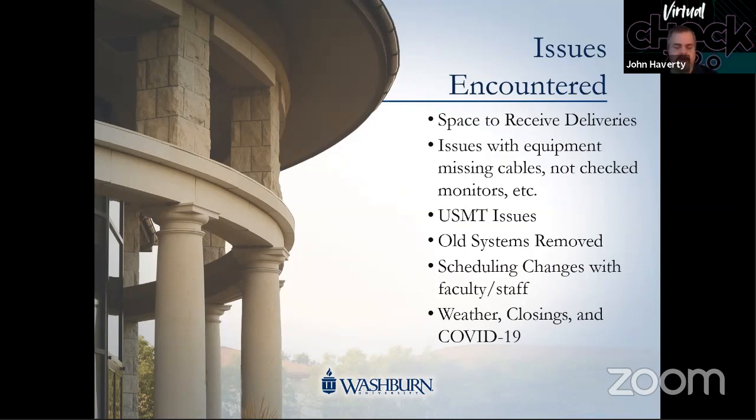As I mentioned earlier, we used USMT to do the migrations. That process worked very well. We had lots of success with it. Some issues here and there that we were able to tweak or troubleshoot and get resolved. About halfway through this, we use SCCM for our deployment for imaging computers and deploying software. Of course, they changed over to Microsoft Endpoint Configuration Manager, or MECM. That got updated about halfway through this process, not thinking anything of it. We went out to do installs, went out to do migrations with our customers, and it didn't work.